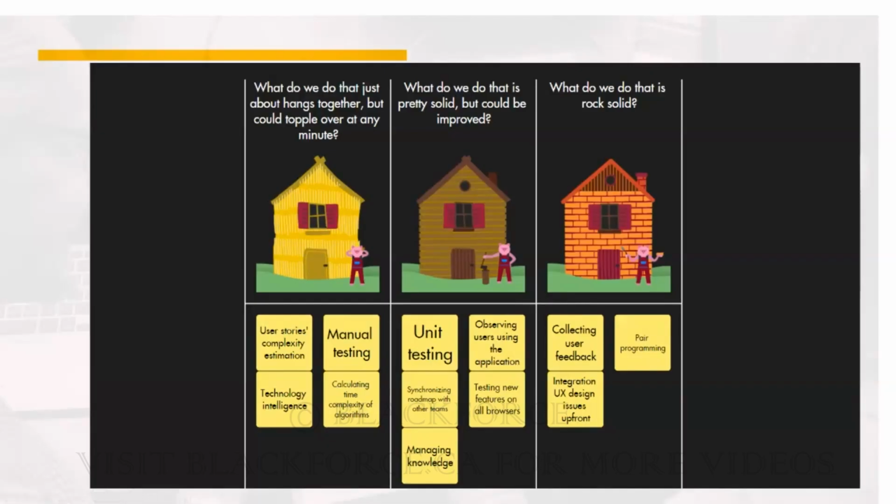To which audience do we do the retrospective? Your Scrum team alone, not your exec, no sponsor, no stakeholder, just your Scrum team: your product owner, your Scrum master, and the developers, okay?